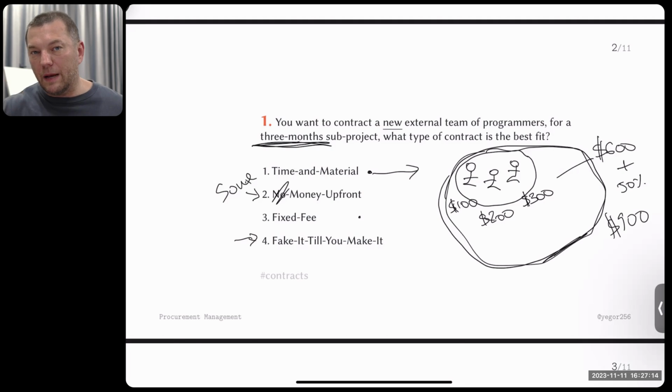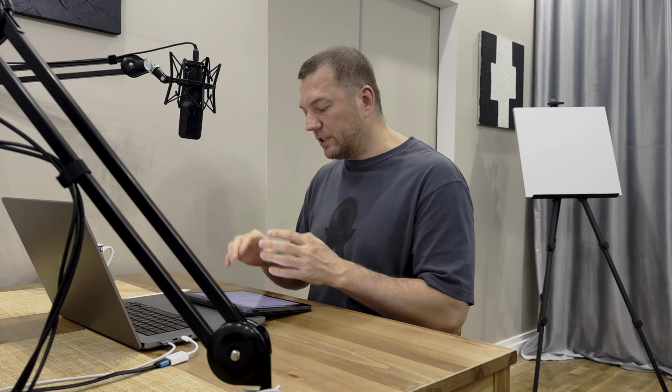And I either accept it, I interview them, I test them, I analyze how good they are, but in the end, I just accept it. And the company starts sending me bills, invoices, asking me to pay next day, next day. They can charge me every week, every month, every half a year. It doesn't matter. But what's important, if these three guys completely fail everything, they do not develop anything, they just make a lot of mistakes, they write really crappy software, I pay. This is the contract. This is the way the contract is formulated.